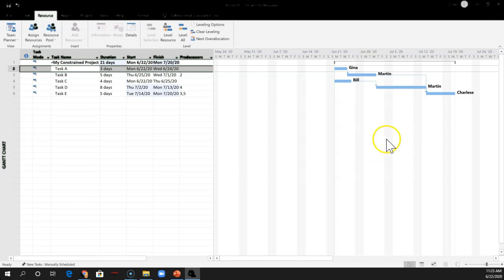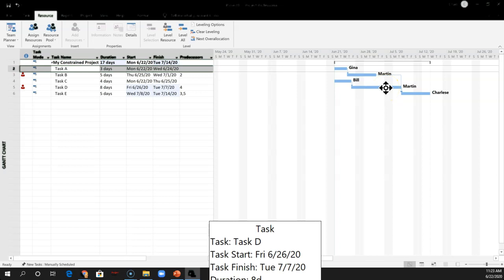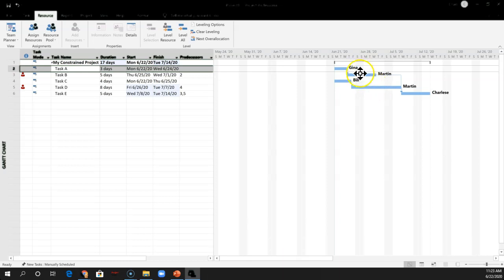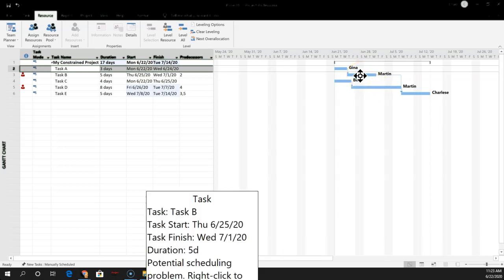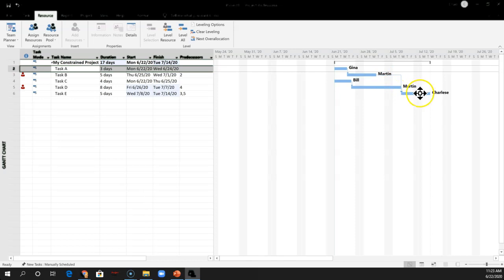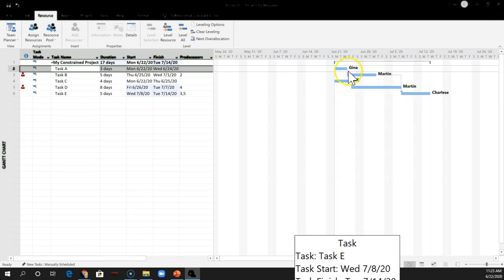So that's an option. We always have that in our back pocket. We say, okay, well there's one option. We know that's going to increase 4 days. So let's clear that. And that resets us. So let's go through the process now of what we were talking about on the critical chain. The first thing we're going to do is halve all the tasks to the 50% mark. And then we're going to add buffers and also put a late start for anything not on the critical path.